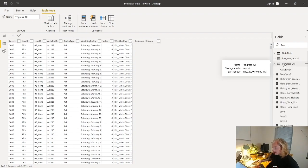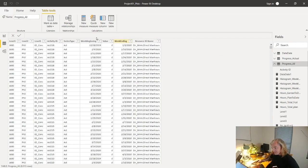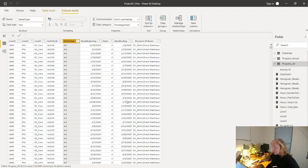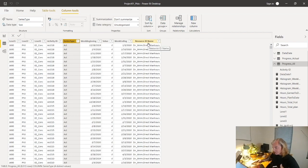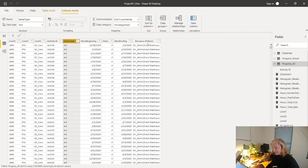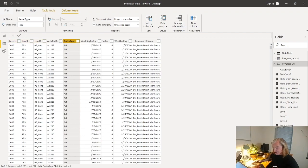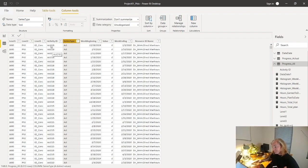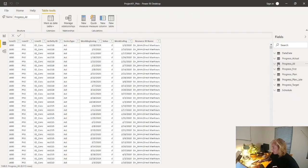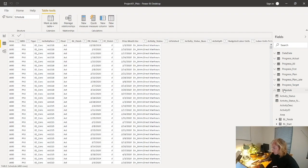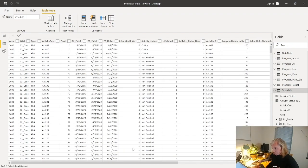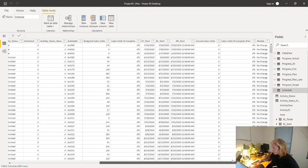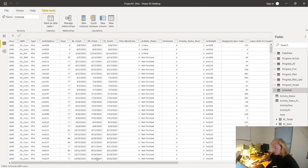Then I bring them all together as a progress table. This is where you have a combined data set with all the fields that you import, and this is really your data layer that you're dealing with. You can do a SQL Server database - this is really what you want it to look like. How you get there, you can get there a couple different ways. You could actually have your WBS structure sitting somewhere else, just keyed off of your activity. There are a couple different ways to do it, but this is what you want to end up with. If you end up with a progress file that looks like that and a schedule file that looks like this, you can then drive everything in your dashboard.